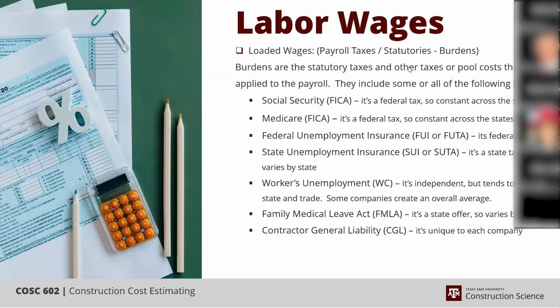Now, once you finish that, you've got your base comp. And as you start to move into your burdened, there's actually a step that my slide here kind of skips. And that is, we have a wage rate that we call bare, which is your W-2 plus your premium.